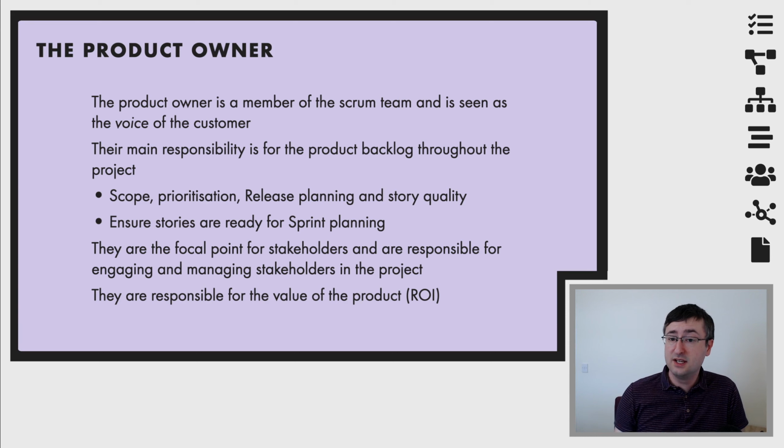Their main responsibility in the project is to look after the product backlog. They're the ones that are responsible for trying to determine the scope of any stories that are being created, the story quality, to ensure that any stories that are being created are of a good enough quality that we can understand what's meant by them, to ensure that when we are looking at stories and how they're going to be used, they're ready for sprint planning. And they're also really there to ensure that this ROI for customers, this return on investment, is key and it's apparent for what's going to be happening. Because again, we need to make sure that any time that we're making something as part of a sprint, it's going to be adding value to the customer.